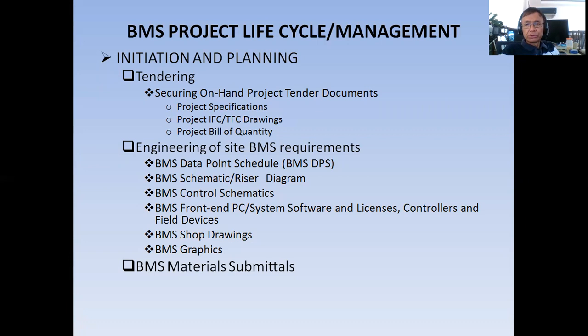Okay. So your task as a BMS engineer is to have your BMS materials approved by the consultant. Of course, it will not be easy. There will be several revisions of these BMS material submittals, because your revision 0 BMS material submittals will be under the scrutiny of the mechanical and electrical consultants. So there will be so many questions, so many queries by the consultant.